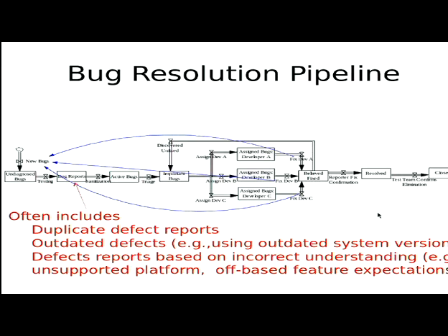Now, if the reporter of that defect ends up checking it and that defect is not fixed, it'll be kicked back to the developer or kicked back into the queue. And typically it's to the same developer. Why to the same developer, folks? Why would you do it to the same developer as did it before? Why is that important? Yeah, they need to know where they went wrong. They've thought it through, or they failed to think it through enough. But they're at least part of the way thinking it through, and hopefully they'll grok what happened and fix it.